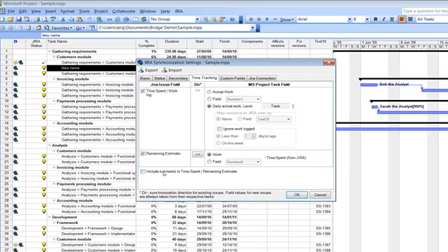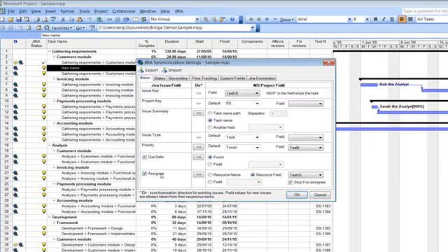Here, talking about the subtasks, that's the checkbox. And when we map resources, assigning to resources, there are three ways of doing it. You can use the resource name as such. So in this case, the name of the resource in Microsoft project should be the same as the name of the resource in JIRA. And then you can use the resource field. So any custom field of a resource, it is not the task field, it's a custom resource field.